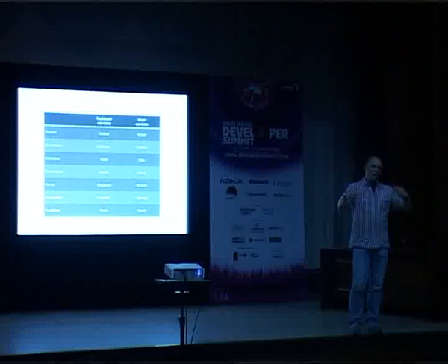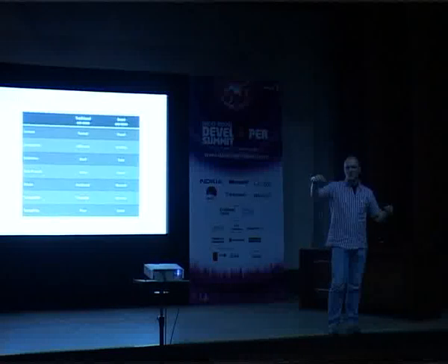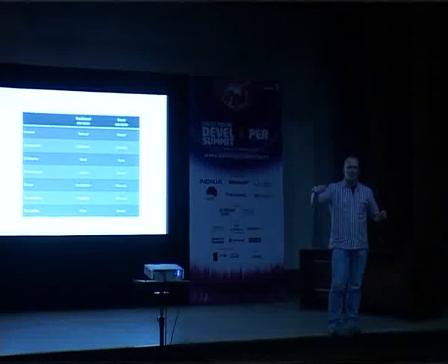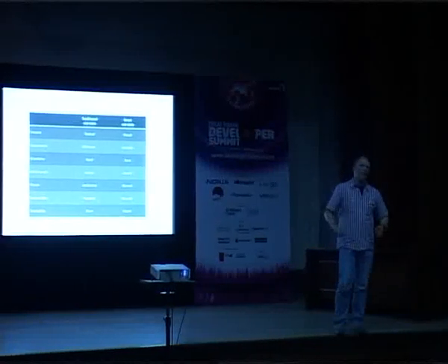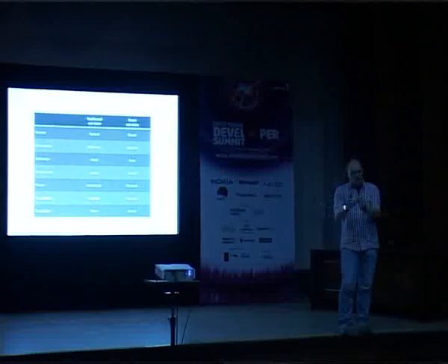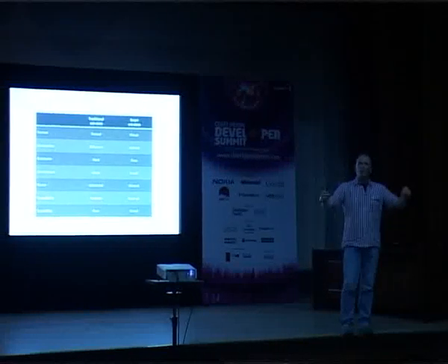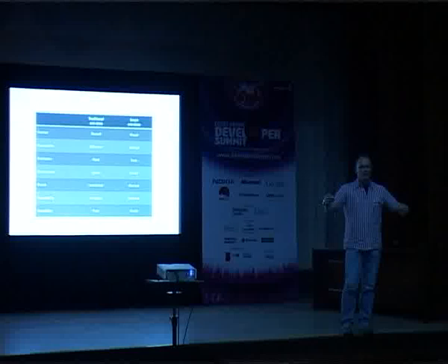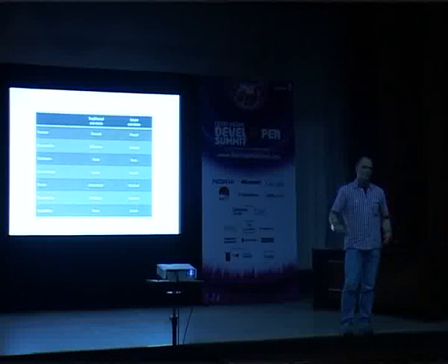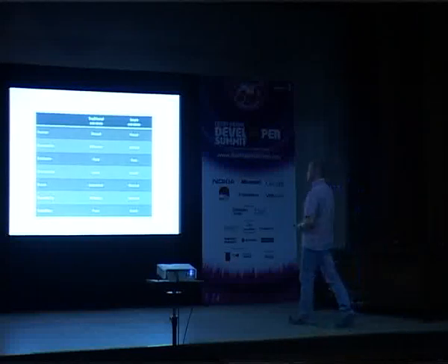Actually, the law of large numbers sort of says, if you have 100 things to estimate, there's probably one that you estimate too low, because it appears to be much more complex than you think it is. But on the other hand, if you have 100 items to estimate, there's probably also one that you estimate too high. So that levels out. So if you have enough items to estimate, in this case smart use cases, your estimate will become much more accurate. That's the reason behind this.